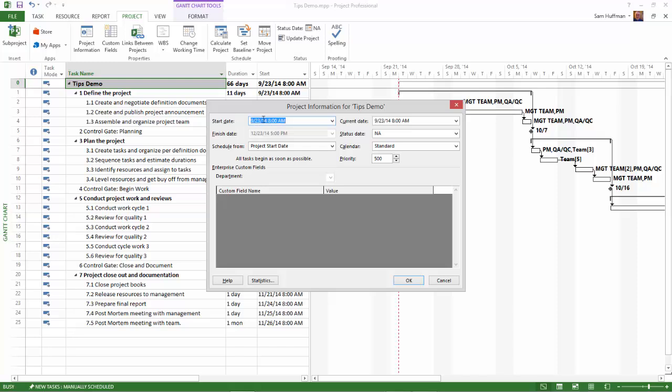You also learned something else here today. Project understands date labels like today or tomorrow.